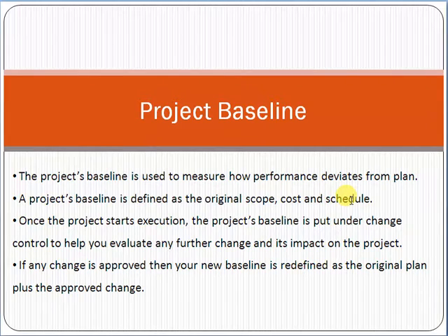The original concept of baseline is basically the original scope, cost and schedule, which is used to calculate performance by checking the deviation from the plan. This is the main concept of baseline. When the project starts executing, we will be checking the performance, and if any change comes and is approved by the major authorities and the stakeholders, the impact of the change will also be added in the baseline, and as a result, the baseline will be redefined.